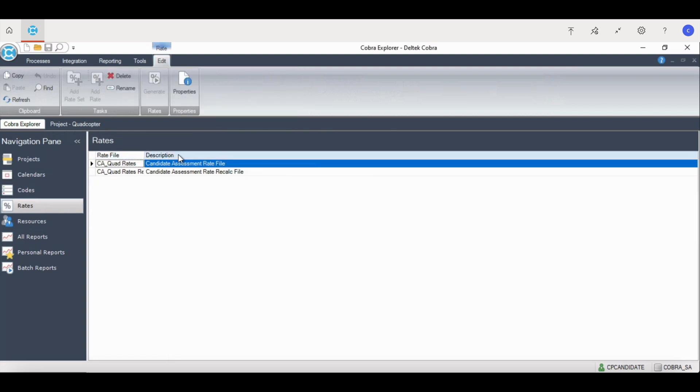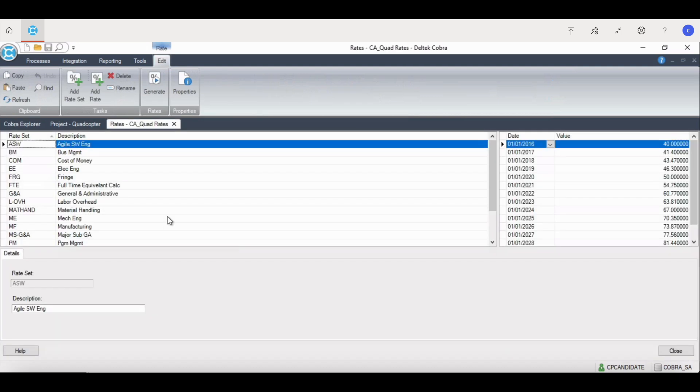When a project is baselined, it's assigned a rate file. As the forward pricing rates get updated, a new rate file is created. The rate file is built with a list of named forward pricing rates, direct labor rates, and overhead rates used to build a cost baseline.